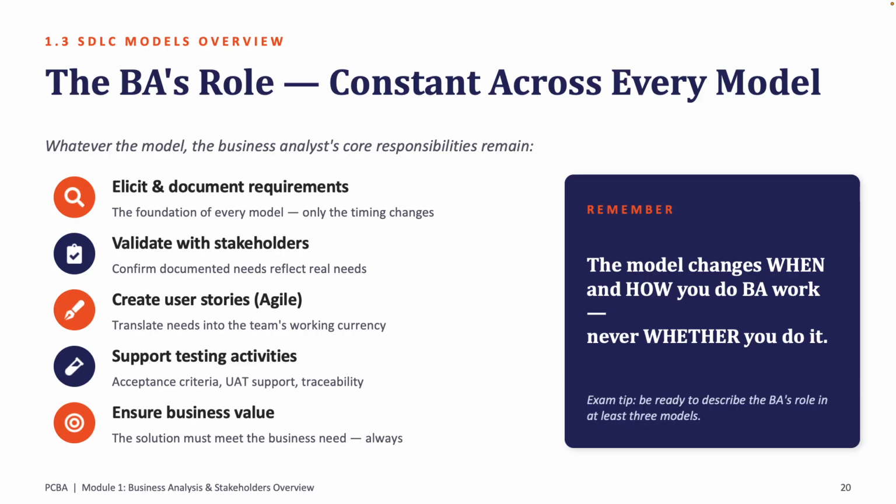You can choose waterfall if your project is small and it has a fixed scope. In terms of requirements, the requirements are stable and fully defined, and in risk handling it has a low tolerance for change. That is another thing. In terms of feedback, it is linear, so feedback comes late, at the end of the project. If you're building something of the sort, you can consider using the waterfall.